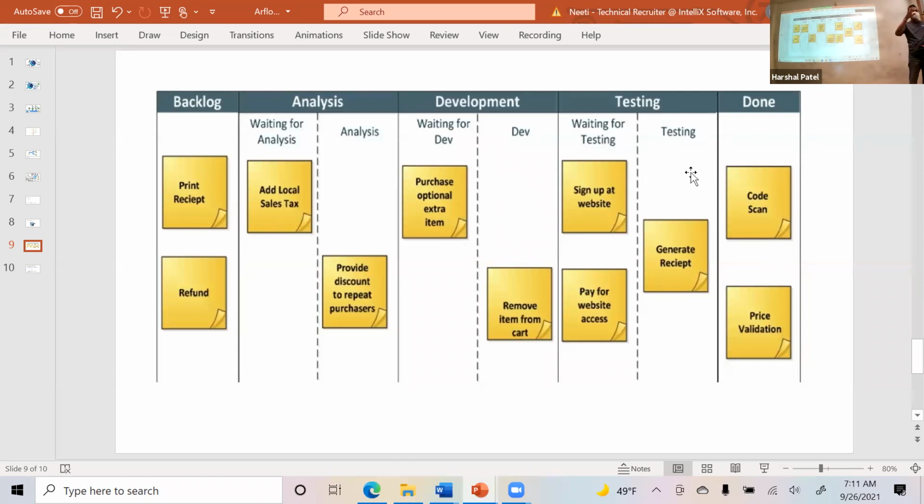So it shows you the board, the progress. What is happening with that particular story? People will move it from stage to stage once they are done. And finally, if they are done, they will just put it in this column. They will drag and drop in the tool. So you drag it and drop it to whatever phase it's supposed to go in. The idea is that it's a self-managing team delivering the product work over 2 weeks or 3 weeks. And that's the idea.